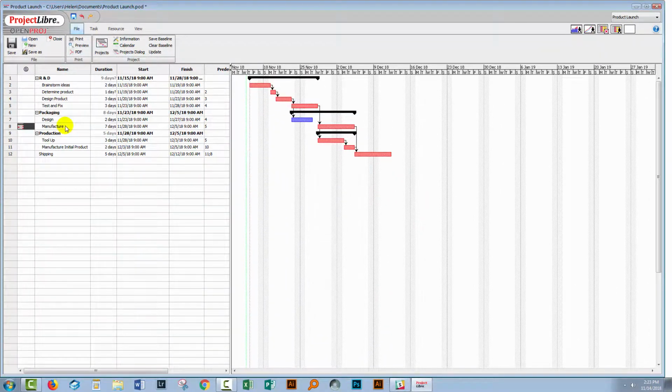So you can see that it's possible to set up special calendars in ProjectLibre. They can be assigned to the entire project, but they can also be assigned on a task-by-task basis. For example, where you have a production system that works 7 days of the week, but the rest of the organization just works 5 days of the week. This same process could be used if, for example, you don't have Saturday and Sunday off, but in actual fact your business closes on Monday and Tuesday.